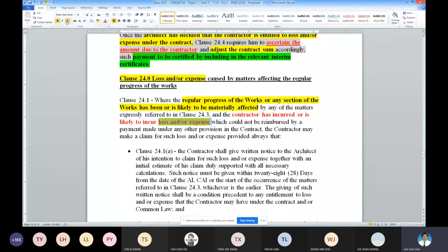On the time side, it is already in the extension of time certificate. Okay, this activity you were granted 20 days. You know 20 days will be the basis for the computation if you agree. If you don't agree, last time I applied 50 days, you only gave me 20 days, then you go for immediate arbitration. If the arbitrator says, okay, instead of 20 by the consultants, the contractor is entitled to 40, so that 40 days will be the official one.